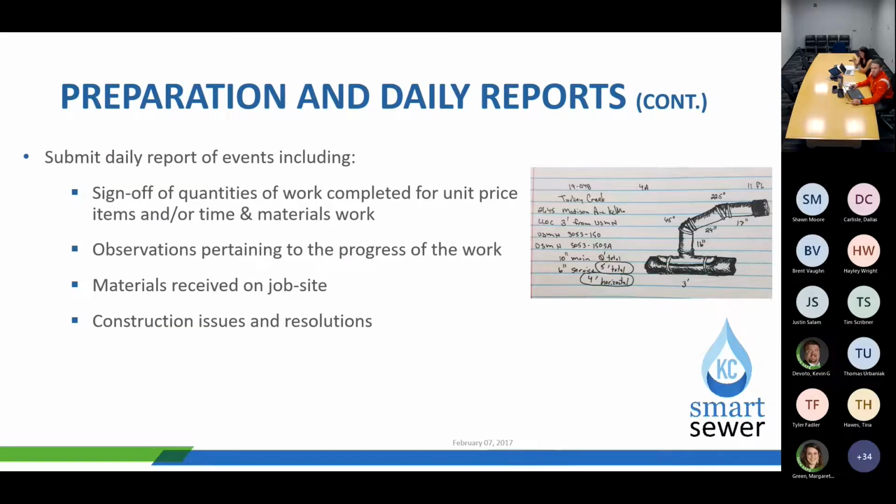So, pertaining to all of this, if you were doing time and materials, everything with time and materials goes down to what time a dump truck got there, what time the dump truck left, every ticket on that job, how many tons of gravel, how many hours of what machine was used and when.